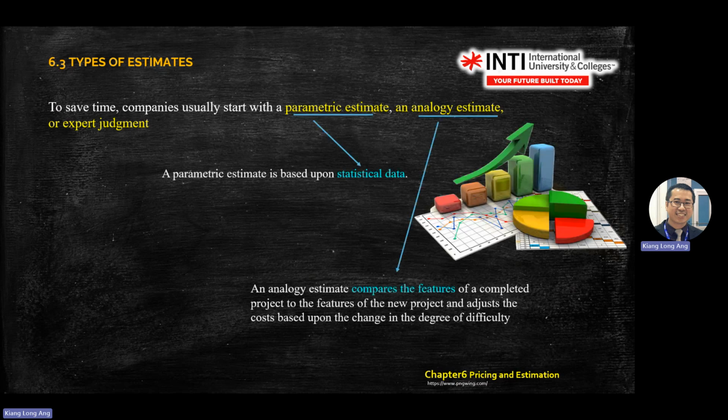You read this one. So how other companies do their cost estimate, all this. They will use statistical data or parametric estimate, or they use analog estimate. Analog means they compare the figures side by side, where they do reverse engineering. They take a competitor's design, go back to the R&D department, dismantle it, then compare its features to their own company products.